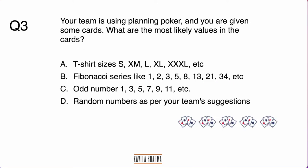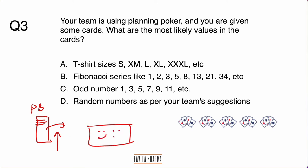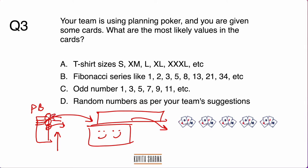Planning poker is a technique agile teams use. There is a product backlog and a release planning or scrum planning meeting. The agile team selects items they can release in the next sprint. They look at high-priority items at the top of the product backlog and estimate how much effort is needed for development of each item, based on the velocity of the team.